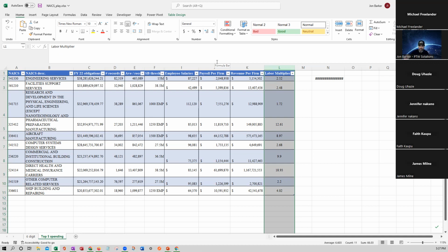Every company has an assigned NAICS code. I don't know how the IRS does it, but every 5 years they publish what the average revenues and the average payroll are. So in my simplistic brain, the difference between the average payroll and the average revenues is my wrap rate.